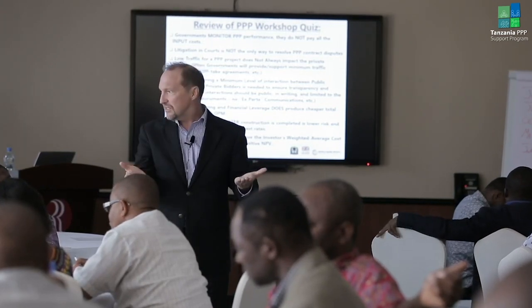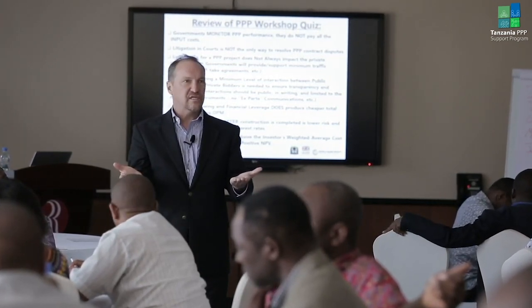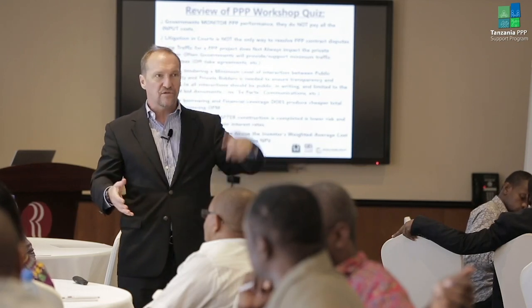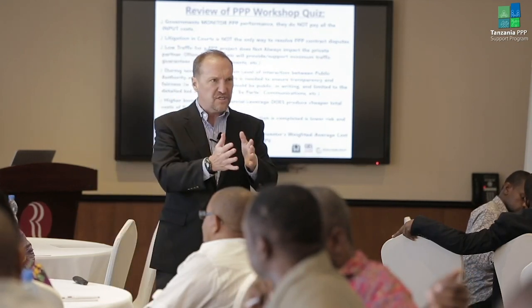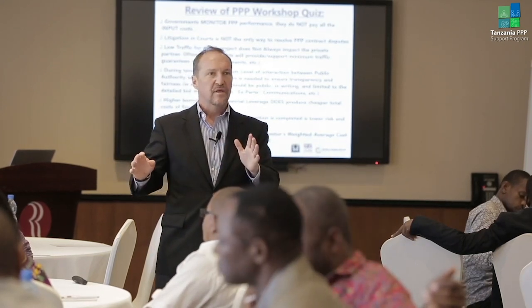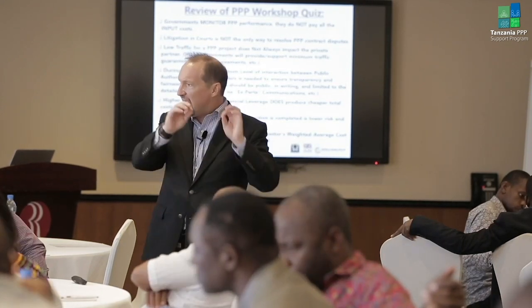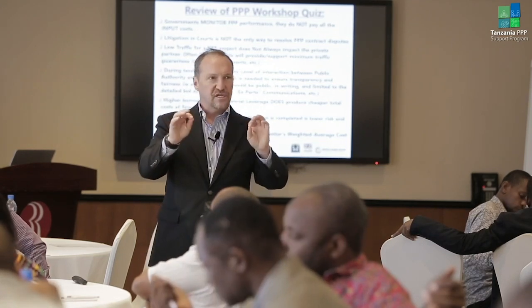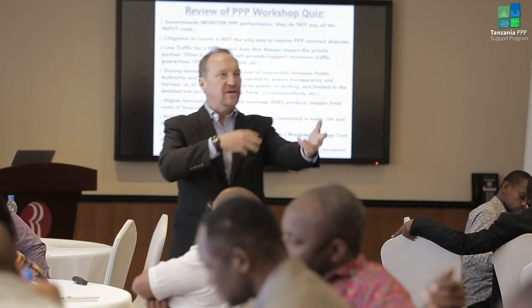When are the risks in the project higher, when the financial closure is reached or when the construction is finished? Yeah, you've got all this money tied up. You haven't finished construction yet. There could be delays, there could be cost overruns, et cetera. Once you've finished construction, some of the risks are out of the way. So sometimes what you see is that after construction is finished, you refinance the project.